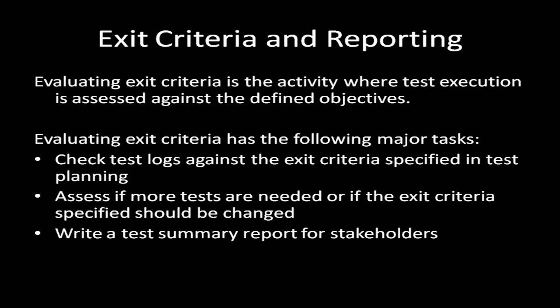We may have a mix of coverage or completion criteria, which tell us about test cases that must be included, acceptance criteria, which tell us how we know whether the software has passed or failed overall, and process exit criteria, which tell us whether we have completed all the tasks we need to do. Exit criteria should be set and evaluated for each test level. Evaluating exit criteria has the following major tasks.